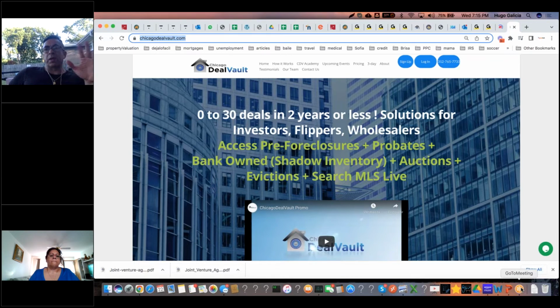Once I did that, it was a big mistake because I think we got the leftover flooring from a previous project. It was not the quality that I expected, and they charged for it like if it was brand new. So never, never, ever let them buy materials because then you always have leftover, right? You're supposed to return that to the store, obviously if it's closed, not open, and then you get credit for that. But if you pay for that up front, you'll never get credit for unused materials. So that's how they make additional revenue by keeping the leftover or utilizing leftover material from previous projects on your project. So no, you never want to pay them up front.